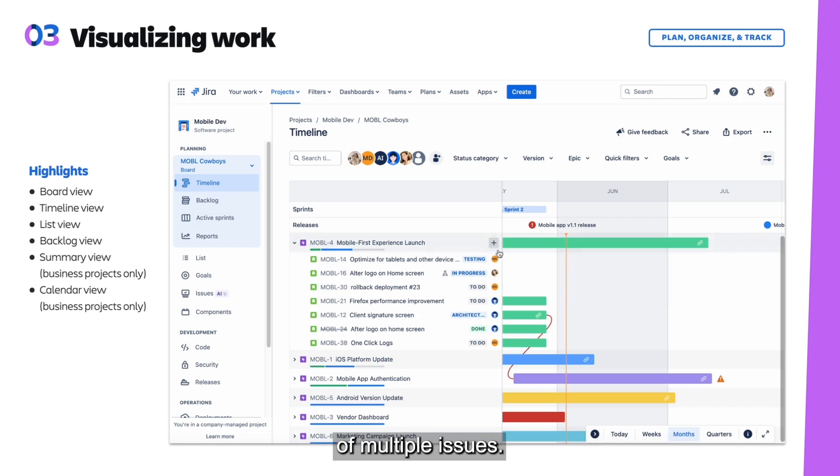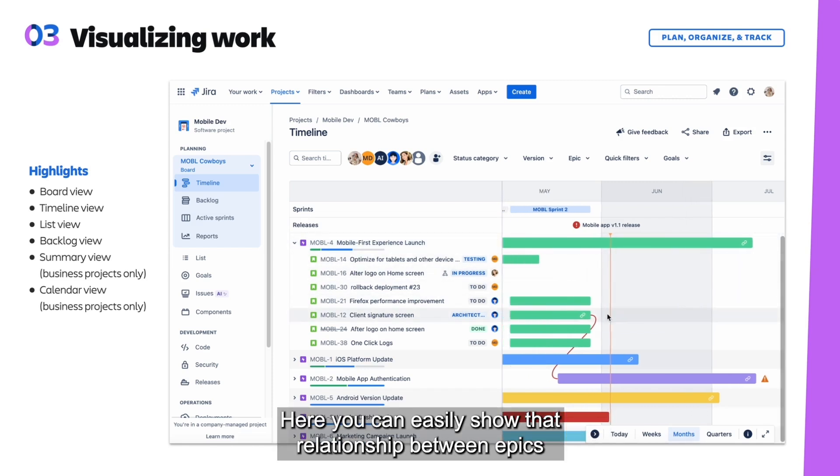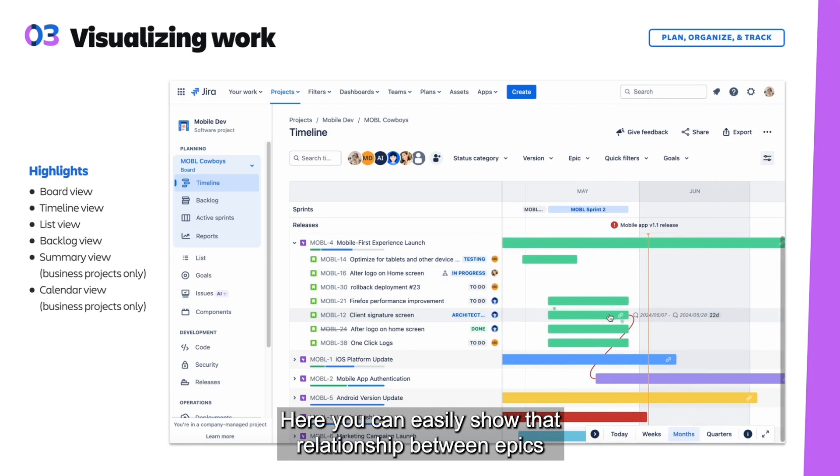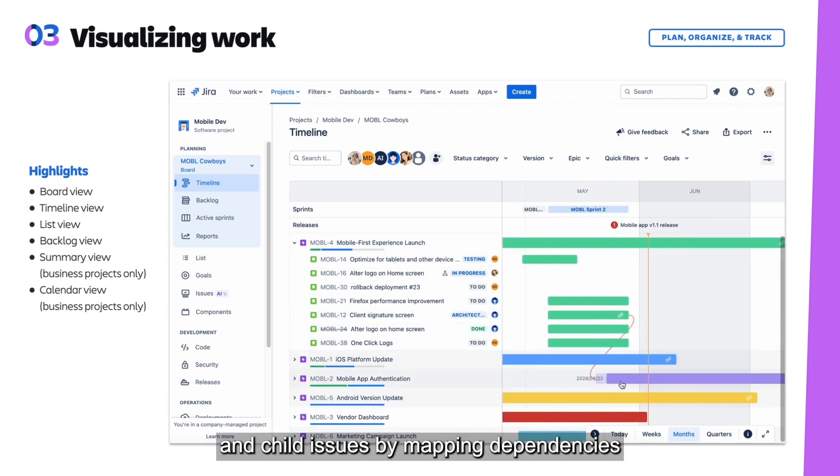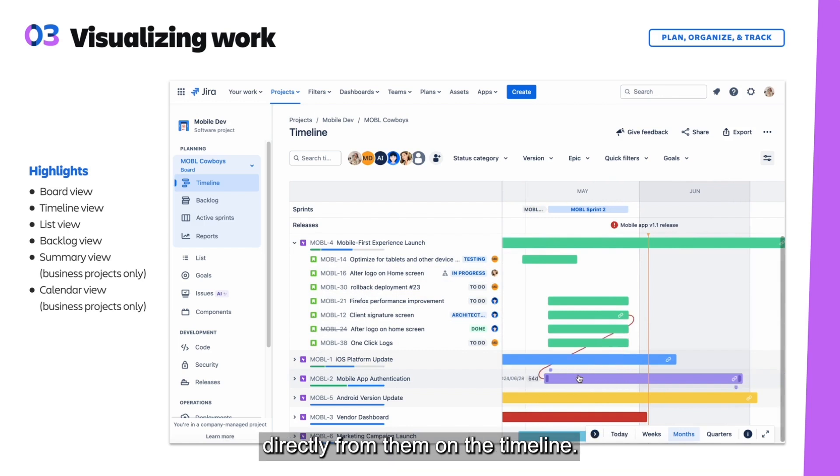Epics are often represented as a collection of multiple issues. Here you can easily show the relationship between epics and child issues by mapping dependencies directly from them on the timeline.